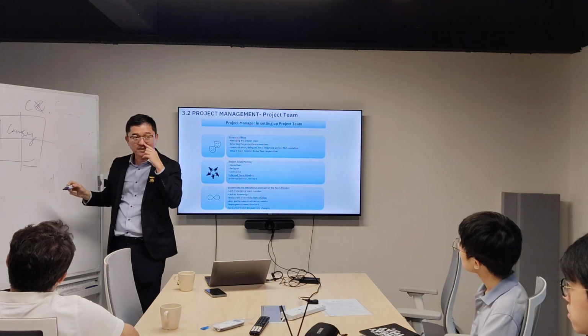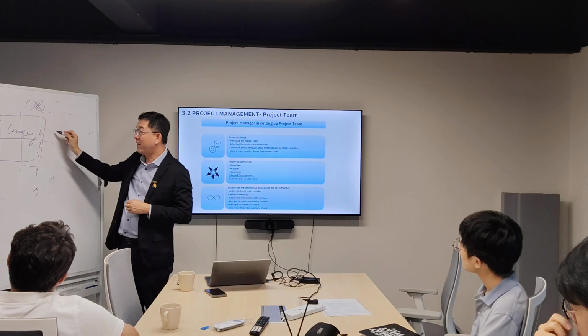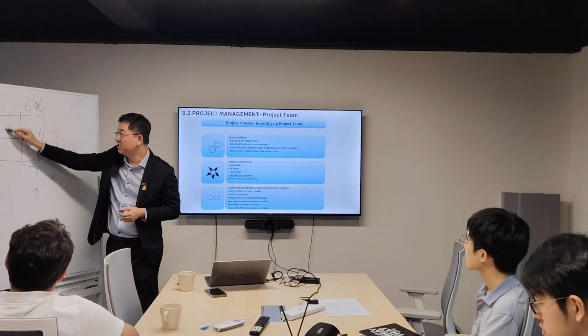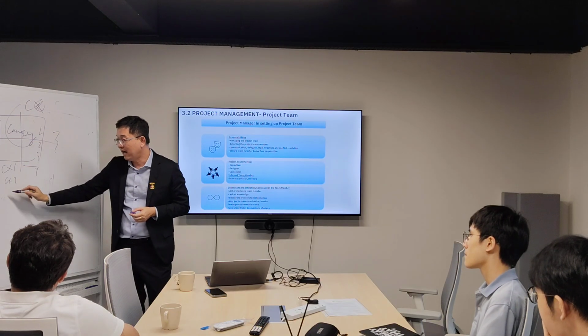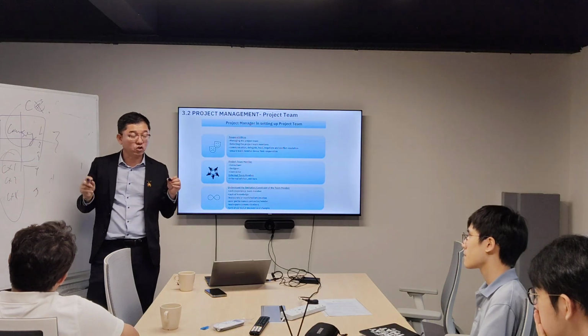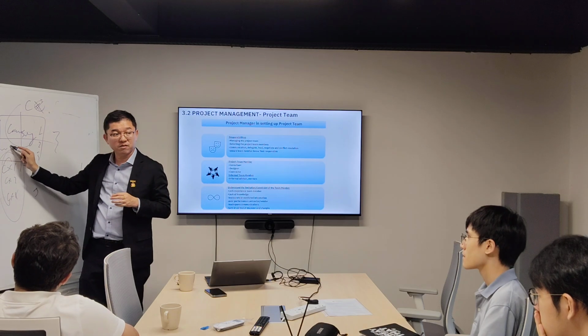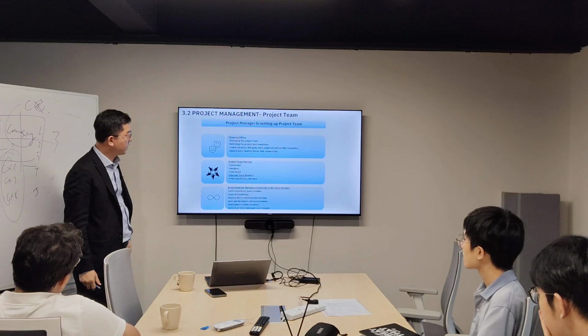What the X actually means is level 1, 2, 3, 4, 5. Each level will have a different process. That's why it's X. And C is the commissioning. That's why we say CX1, CX2, until CX5. So in this testing, for the construction of the data center, we need to have the commissioning manager, which means you need to set up a project team.